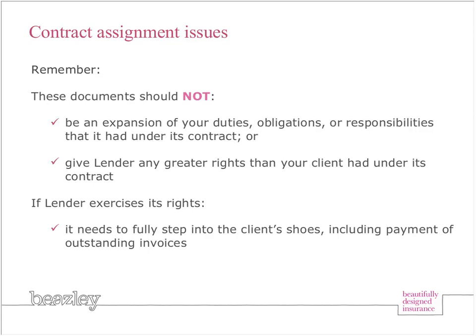So the client is telling you, okay, we're assigning your contract to the bank. Now the bank is your client. We're out. We have no more obligations to you. And the bank is saying, yeah, we're going to step in, but we're not stepping in for what you did with your client. So if your invoices are not up to date, you could be in a situation where you're kind of in limbo and you're out money.